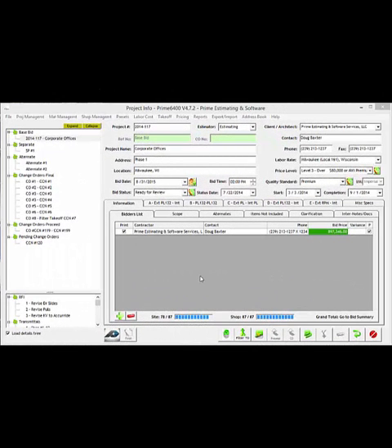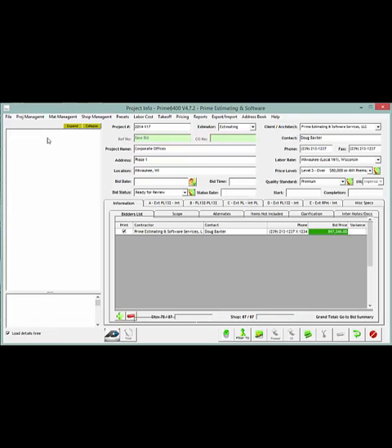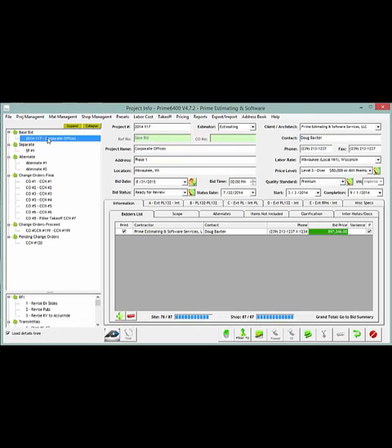We want to illustrate the ability for the user to prepare a change order for an awarded project. Basically, the structure of all the estimates within a project are the base bid estimate, typically separate prices, alternate prices, all prepared by the estimator. But as the project has been awarded, you'll continue to do change order work to pick up all, of course, revisions and changes on the project.